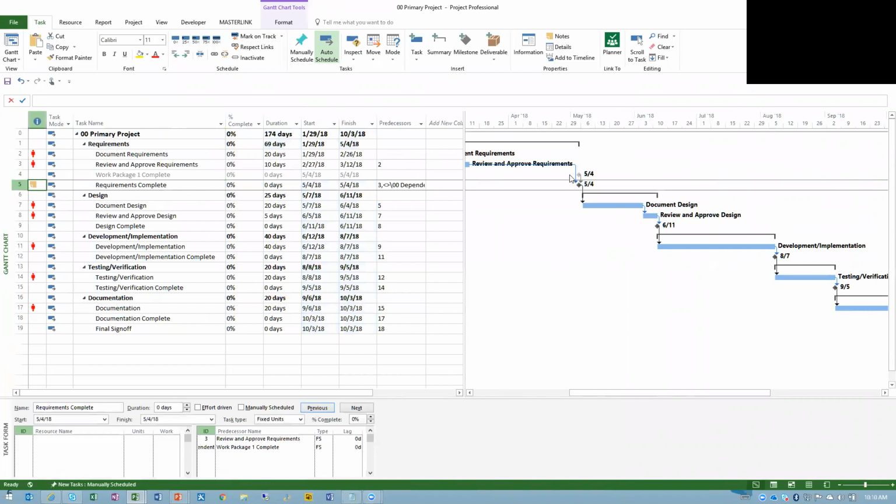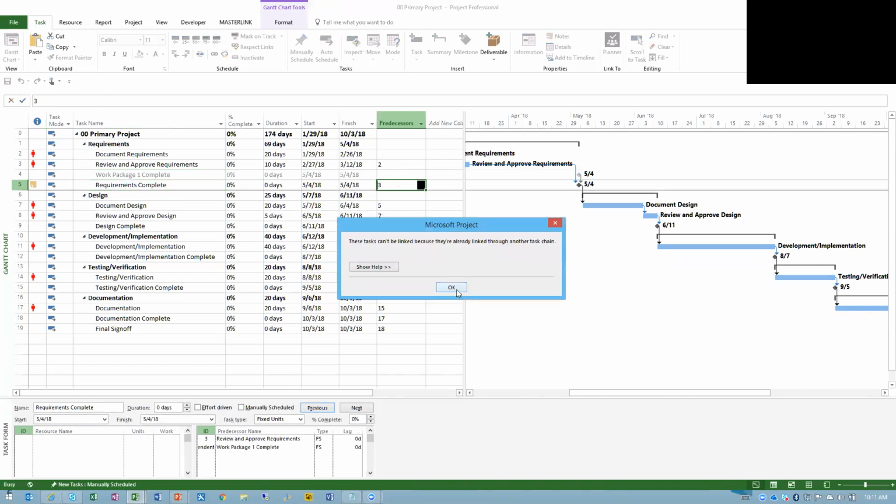And notice in my Gantt, when I put that external dependency in, it moved my milestone date out. Okay, so again, this is how you manually type it in, but I'm going to show you a much better way. So let me go ahead and remove this. I'll show you a much better shortcut. So instead of manually typing it in, just remove it here.